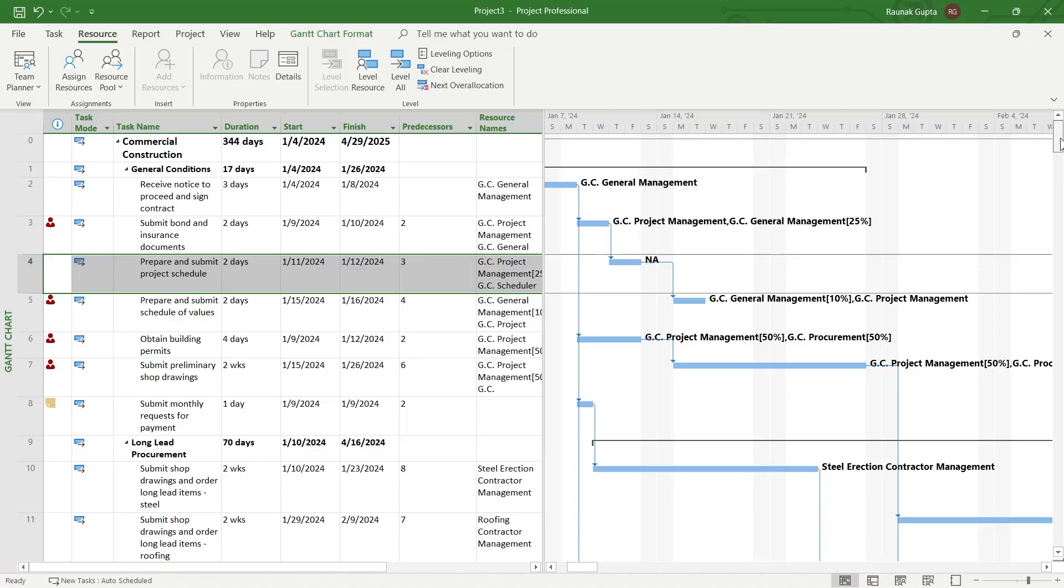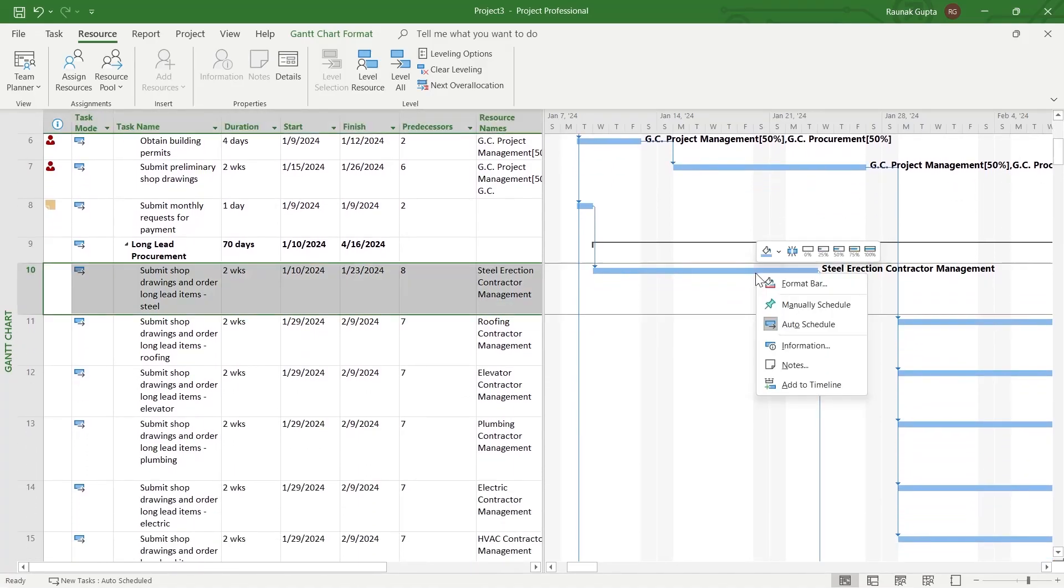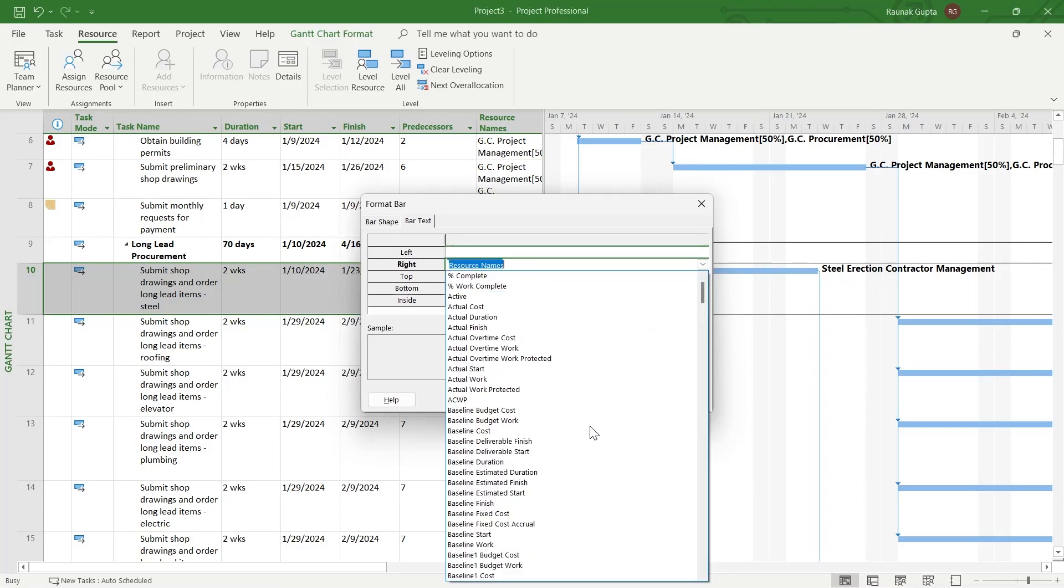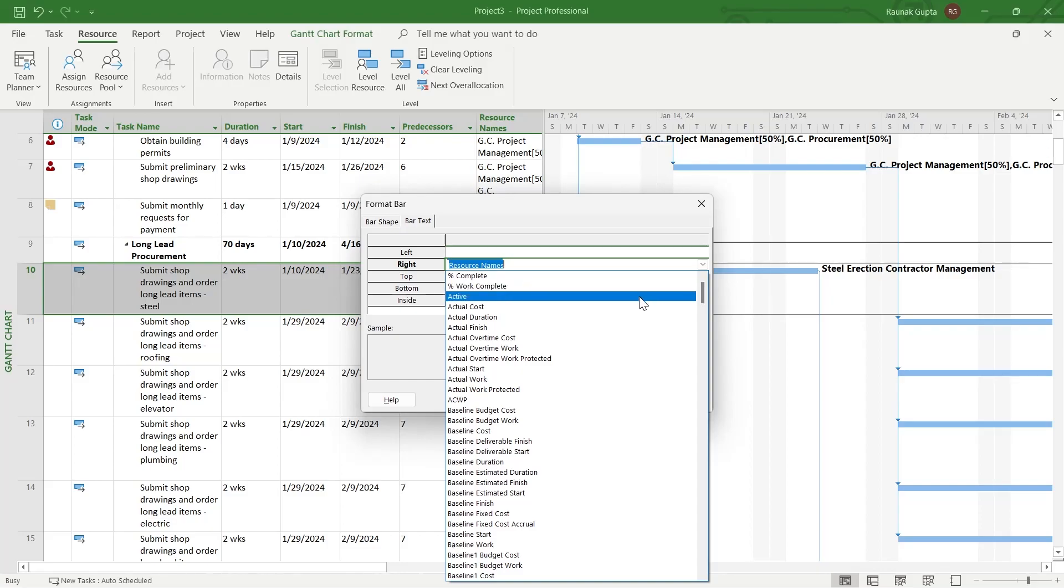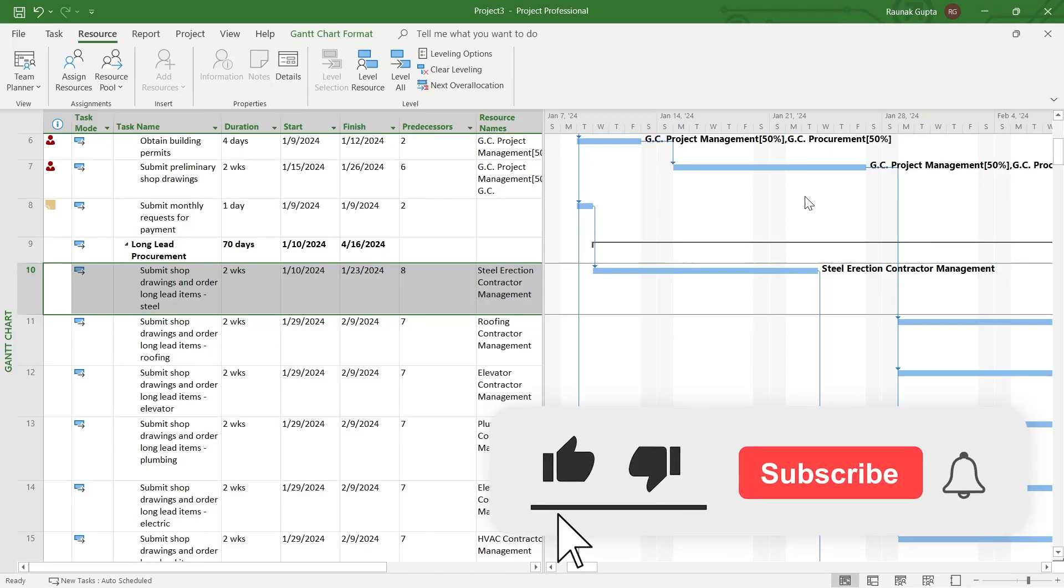So simple way of labeling any bar is right clicking on it, clicking on format bar and clicking on resource names and choosing one of these options and the bar label will be changed according to your preference. So that's the way through which you can add labels to your Gantt chart in your Microsoft project.